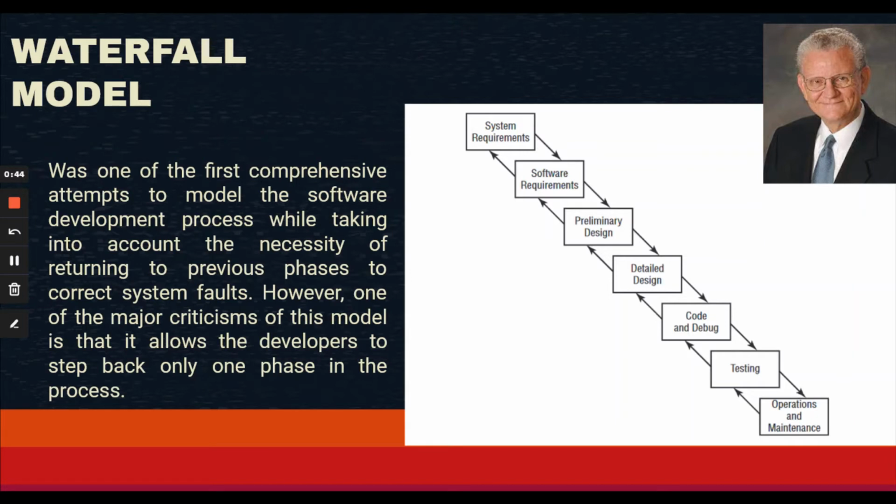The Waterfall Model. It was developed by Winston Royce. The traditional waterfall model has 7 stages of development. As each stage is completed, the project moves into the next phase. As illustrated by the backwards arrows, the modern waterfall model does allow development to return to a previous phase to correct defects discovered during the subsequent phase.